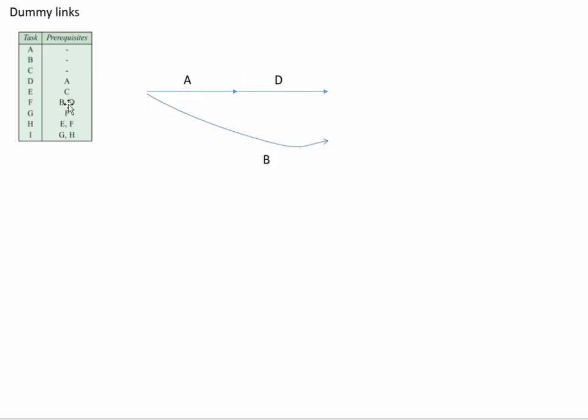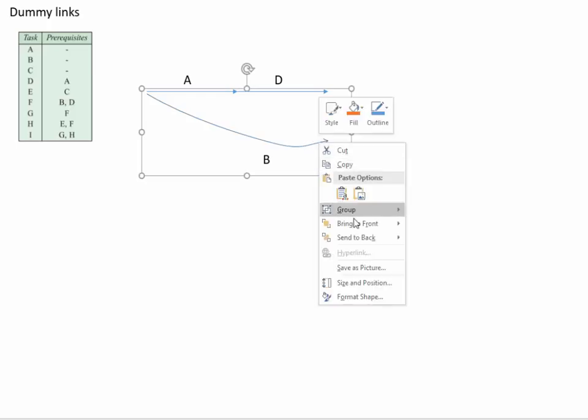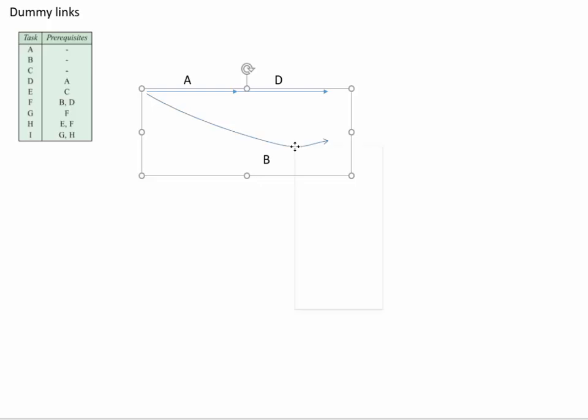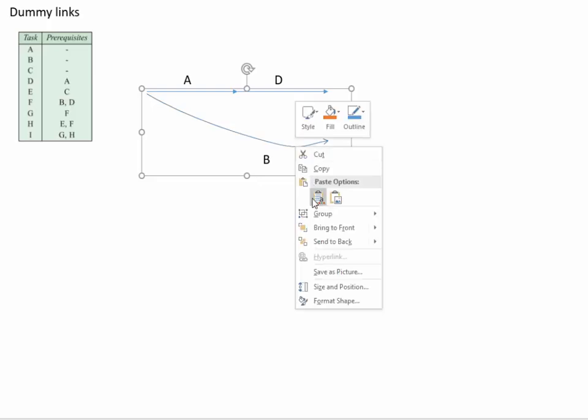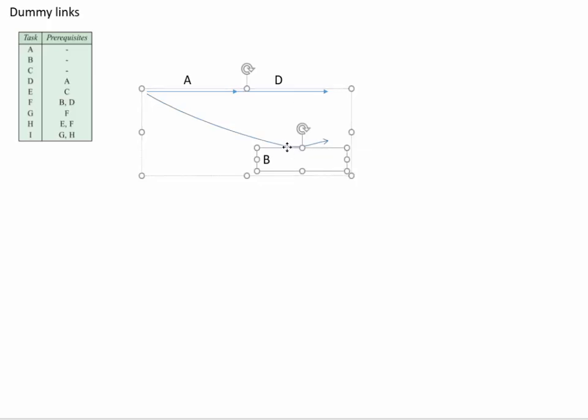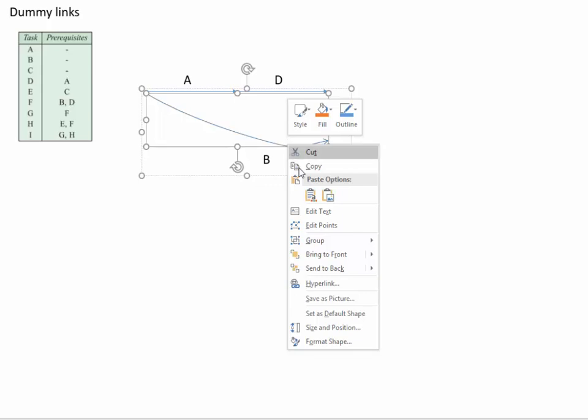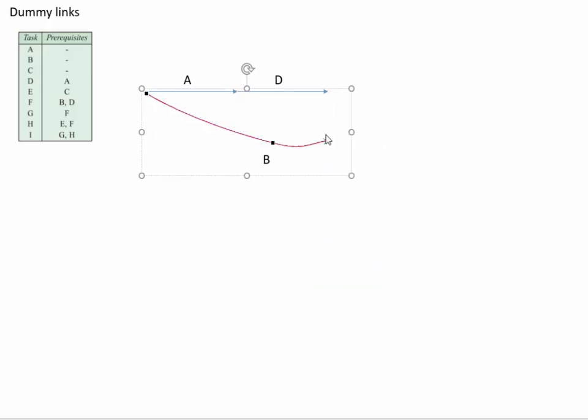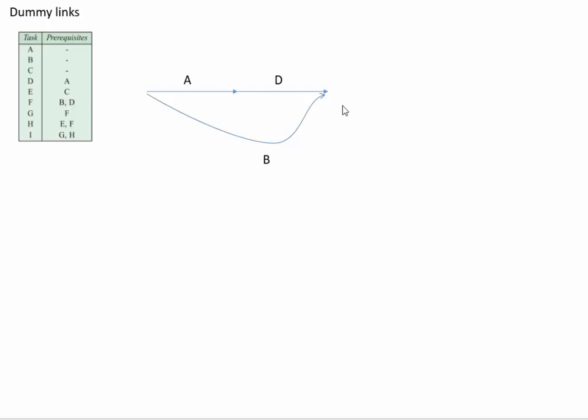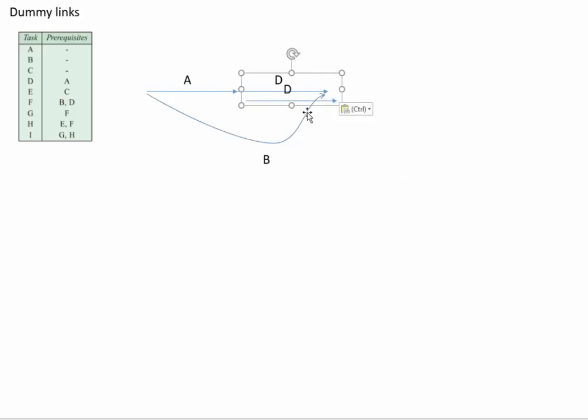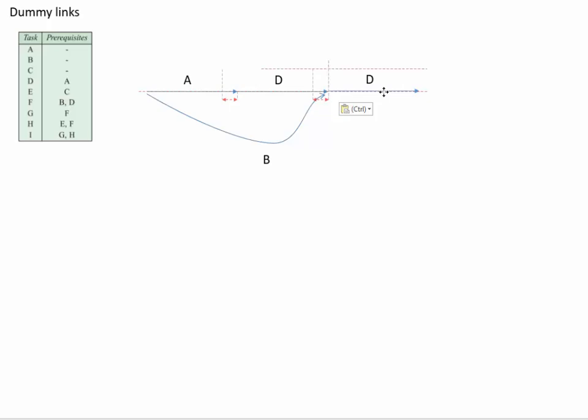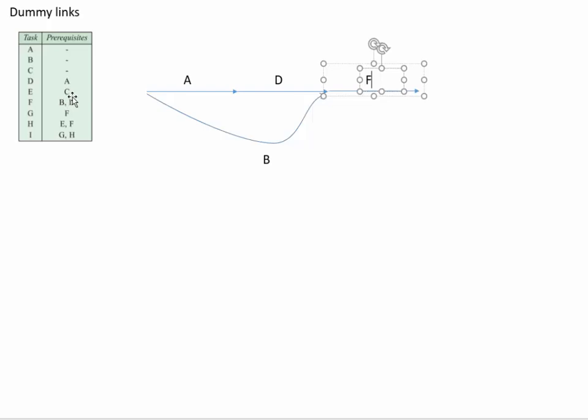B and D lead to F, so I've actually got to change this to make that go down here because B and D work together to make F. B and D are prerequisites for F.